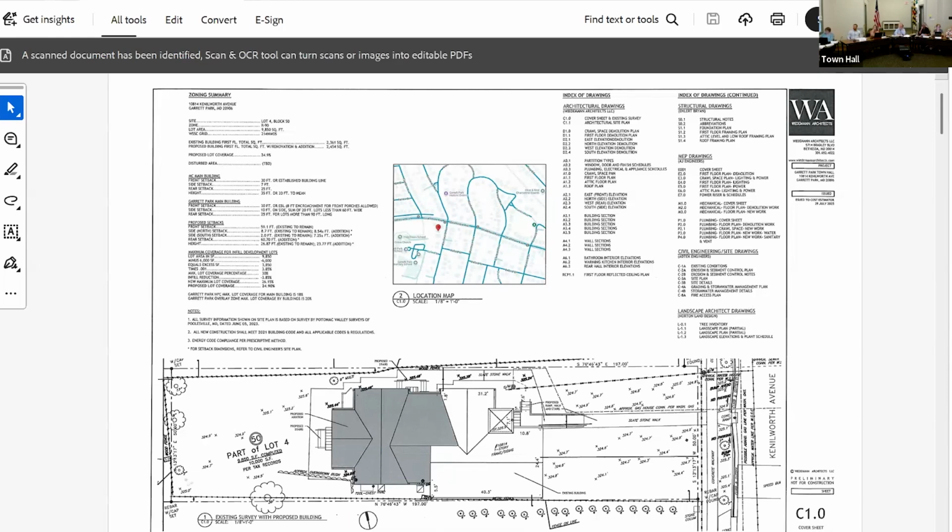The civil engineer was responsible for developing the site work, the grading, stormwater management, overall site improvements outside the limits of the building. Also to prepare documents for mandatory referral for the county. Some of that was supplemented by work that we did. They require a photometric study to show light levels throughout the property to make sure that none of the neighbors are affected by bright lights and things like that. So it's a collaboration between us and the civil engineer.